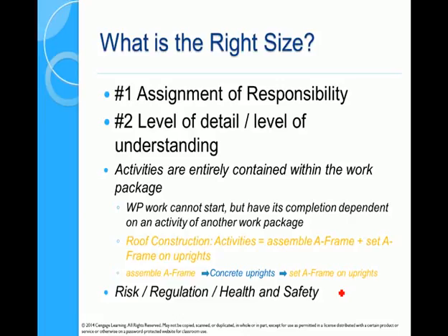That's number one. Number two is a work package needs to balance this idea of micromanaging versus providing enough information. We'll look at executing and leadership. In that topic, we'll talk about delegating responsibility, not delegating work. So work packages need to have enough detail there to allow the person to get on and do it. But you don't want to have so much detail that you're dictating what they should do or micromanaging the person responsible. So it's a balance between the two.